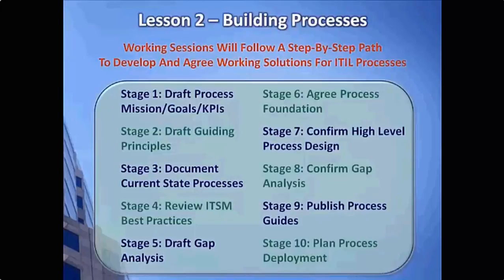One of the interesting things about this approach, and the reason we use the term stage here rather than step, is that it's recommended that you finish each stage before you go on to the next one. So for those of you that may work in a program office or are project managers and you need to communicate how far along this effort is in terms of building processes, you can communicate that back by each of the stages.